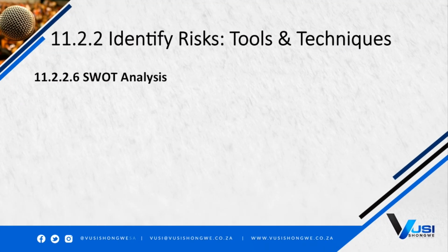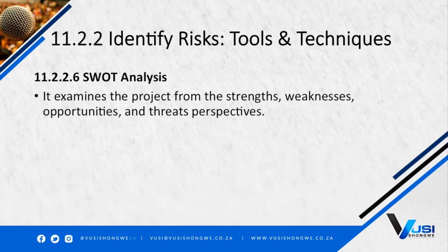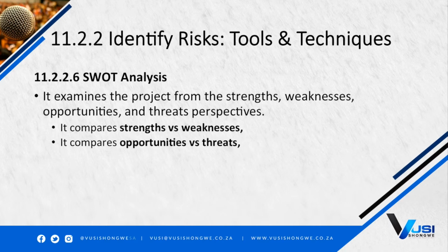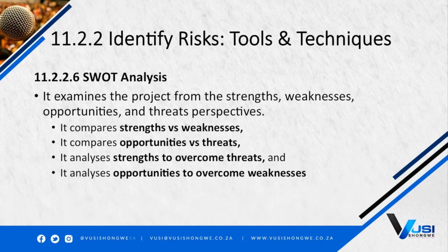SWOT analysis. It examines the project from strengths, weaknesses, opportunities, and threats perspectives. It compares strengths versus weaknesses. It compares opportunities versus threats. It analyzes strengths to overcome threats, and it analyzes opportunities to overcome weaknesses.